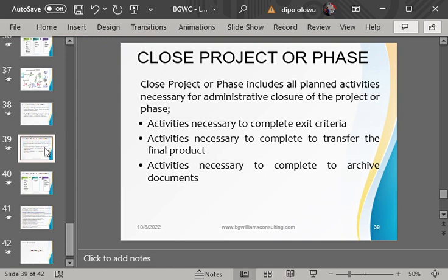So it is possible that you have finished a project and two weeks later the customer calls you and tells you that this function is not working again. What happened? Do you get it now? So you can't say that technically we have finished the project, let's close, until every aspect of the project is done, which includes confirmation of the requirements of the work done, getting final acceptance, paying off all your suppliers, paying every payment for the project, getting a feedback of completion from the customer, and archiving all your reports, doing your lesson learned documentation, and all that needs to be done.